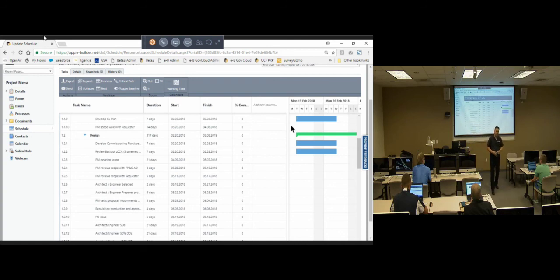So when a project starts up and you have access into that project and you want to look at the full-blown schedule of how things are laid out, so that they don't contact you at the last minute and say, hey, I need something next week, you can see it in advance. And they should be maintaining this. For any eBuilder project, they actually need to update this before the project even starts. They need to get with the client and update it. So once you get assigned to this particular project, then you have visibility of it.